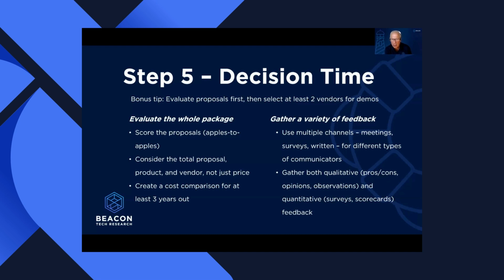The other thing is try and get them to fill that out in real time, because at the end of a day of demos or at the end of a couple of days, it all mushes together and you're not going to remember who showed what when, and the surveys then become fairly pointless. That is really important. And I handle that by telling people the survey will be open till the end of the day and then it's going to be closed. So if you want to have your voice heard at all, it's got to be that day that you see that demo.